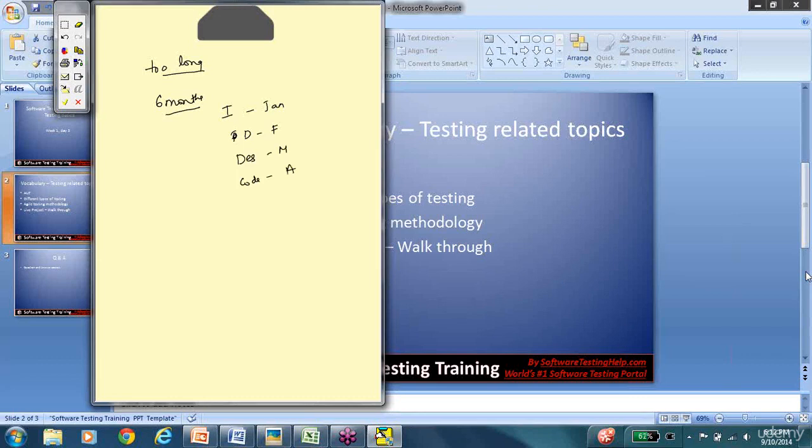Thank you, Sohini, again. We started with building 10 requirements. If we start building with 10 requirements and for some reason the client says, hey, in addition to 10, I need 1 more or 2 more, or I don't need 1 or 2, I need to descope this. So what started as 10 requirements has to be cut short to 8. In either case, whether you want to increase or decrease the scope, you will have to go back and revisit your initiate phase and start again. So there's not a lot of flexibility in the waterfall model.